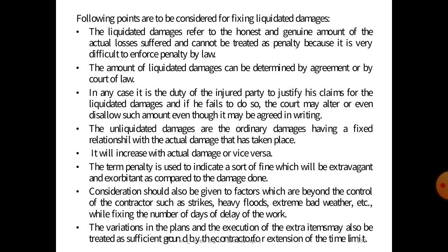Second, the amount of liquidated damages can be determined by agreement or by a court of law, and in any case it is the duty of the injured party to justify his claim of liquidated damages. If he fails to do so, the court may alter or even dissolve such amount even though it may be agreed in writing.